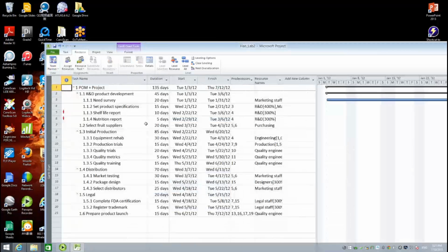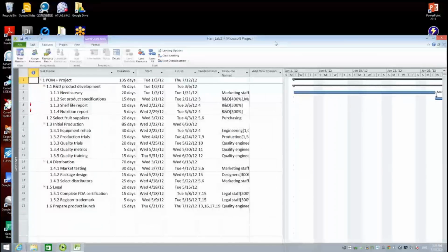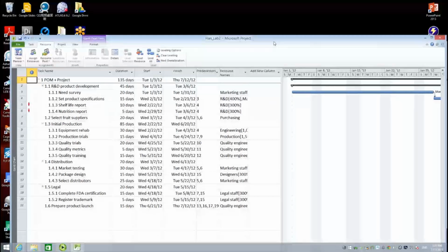So what is the project network sensitivity? It simply suggests how likely the project will get delayed. Important indicators for sensitivity include how many critical paths are there, how many critical activities are there, and the magnitude of the slack time for non-critical activities. So basically, the more critical activities we get, the more sensitive the project network will be. And the smaller slack time for non-critical activities, the more likely the project will get delayed. That means more sensitive.